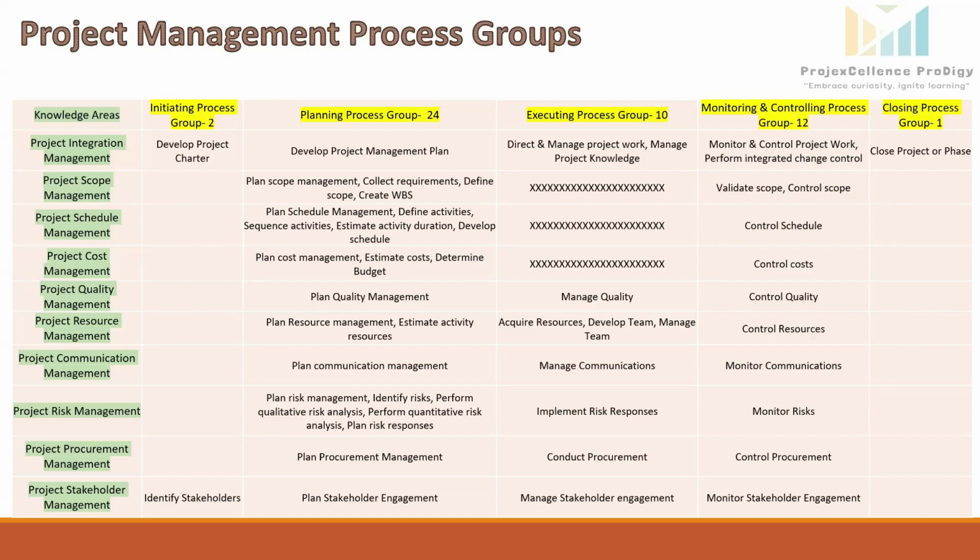Next, under project resource management, there are three activities: acquire resources, develop team, and manage team. A lot of work is to be done, as negotiation and contracting with internal or external suppliers will happen to acquire the resources. Under the develop team activity, training sessions will be conducted to enhance the team's skills and competencies. Team building exercises, colocation, and reward and recognition will be introduced during this process.